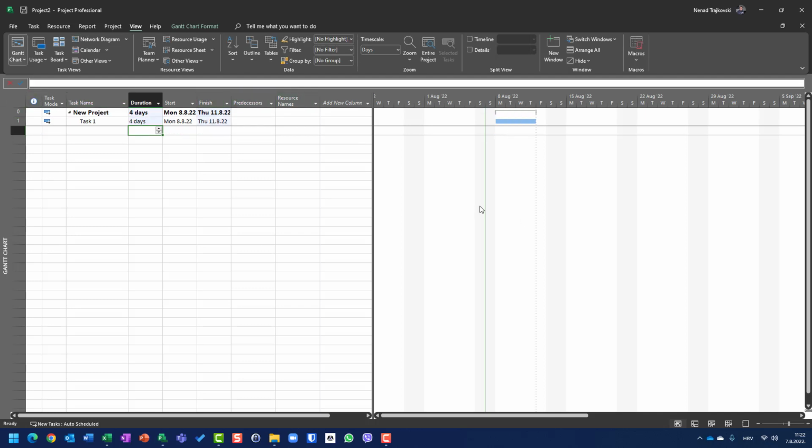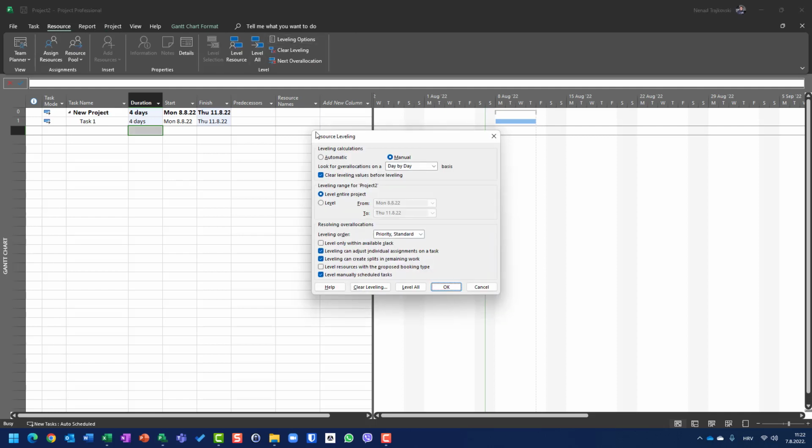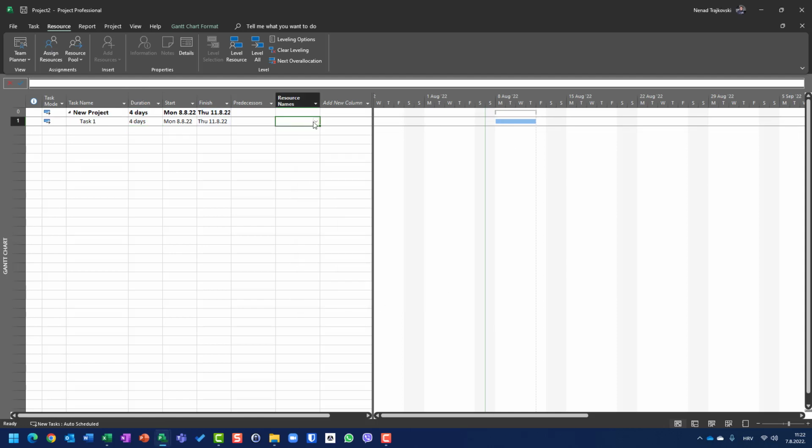Before I do any assignment, I will go to resources. I will go to leveling options and say, okay, I want leveling calculation automatically. See, automatic. Now I will put John here and Mary. And I will say task 2, and I will say 4 days.